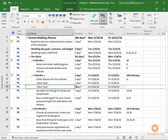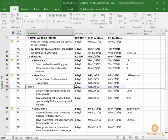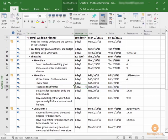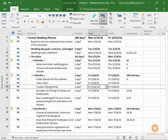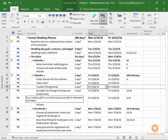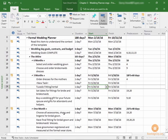What we want to add here is tuxedo fitting slash rental. This will take one day, and I would say we don't need a predecessor for that. It doesn't necessarily need anything else to happen first. And I think May 20th is fine, so we can leave this information here.